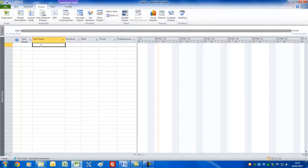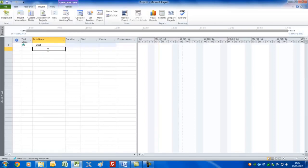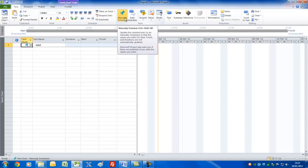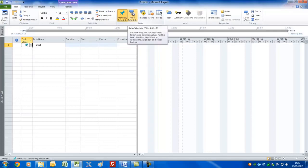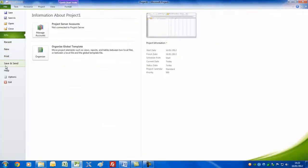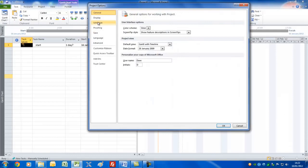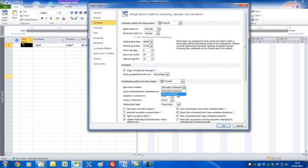The next thing is to set up the tasks themselves. If we go into Task Name and type 'Start' — that'll be my first milestone. You can enter it by clicking another cell, using the Return key, or the arrow keys. Notice we've got Task Mode set to manually scheduled tasks, which I don't think is a good idea. Go to File > Options > Schedule and set this to Auto Schedule.